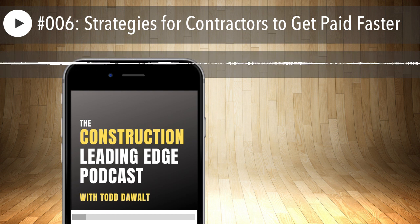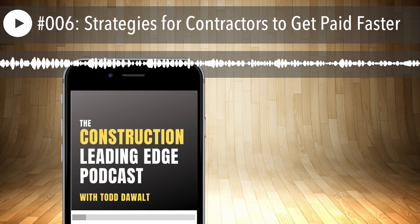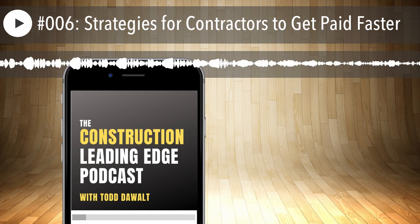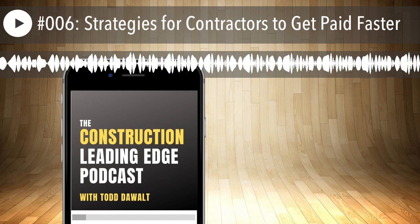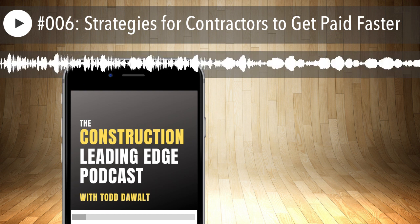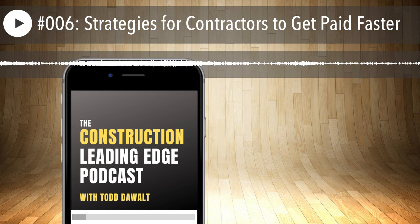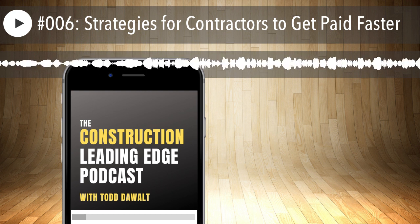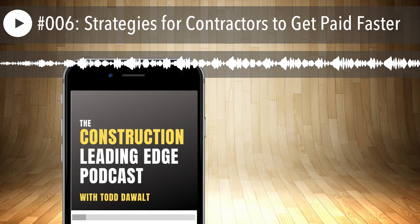Step number 1, inspector signs off. Step number 2, engineer signs off. Step number 3, consultant signs off on your pay request. Step number, whatever step we're on. Next, architect signs off. Next, project manager. Then there could be a department head. There could be a city council. There could be a board of directors.